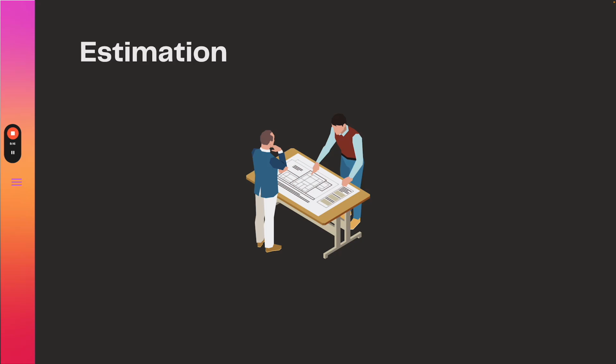Now you will have seen this on the Kanban board and demonstration that I did. Divide the project into smaller, more manageable tasks, such as user stories or use cases. Again, we spoke to those in some previous modules. Then estimate the effort required for each task. Assign an estimated effort in hours or days for each task, taking into account factors such as complexity, uncertainty, and dependencies. Then use some historical data. You can look at data from previous projects that you may have done to inform your estimates and identify patterns or trends that can help you make more accurate predictions.